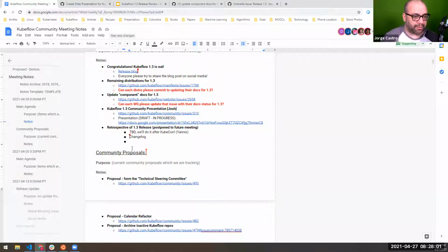Yeah, and I'll add this to the notes, we should probably make it clear that for the release, at least towards the end of the retro, when we're talking about 1.4, maybe it'll be a separate 1.4 planning meeting or something, we should definitely get input from all the working group leads. Like, do they sync schedules? Do they release before? Because I know we had a KF serving release before, and then a point release relatively soon after, right? So I think if we can give the working groups a calendar maybe more ahead of time, they might be able to make better decisions. I don't know.